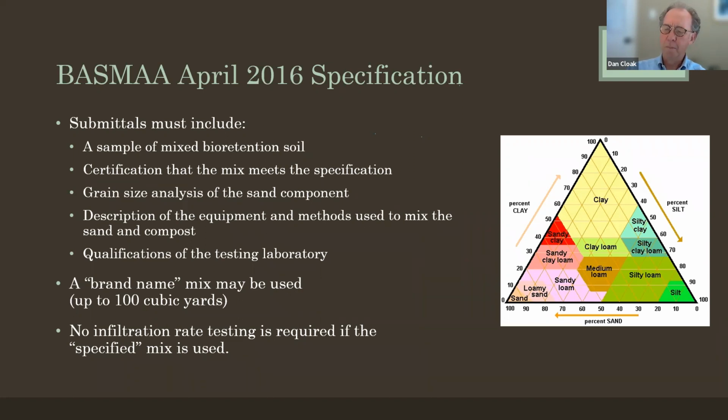And we call it the BASMA mix or the bioretention mix or whatever. And we can just send that out with an order and have it installed without the requirement to have a specific test of that batch. And just noting that if this mix is used, no infiltration rate testing attaches to that.